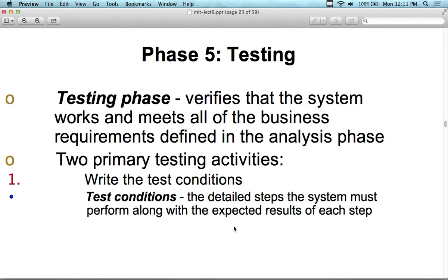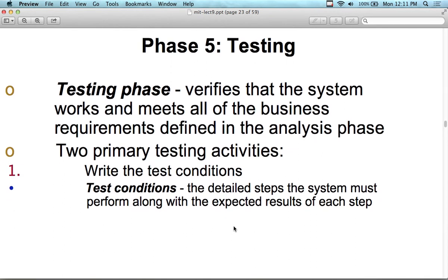What you don't want to do is hire a company to design it and then another company to build it, unless you have to. Because what ends up happening is they're not going to like the design. Sometimes when you design it and give it to another company to build, you discover that company doesn't like your design. So anyway, that's why the design and the build normally happen by the same group of people, so that at least they're in consensus.